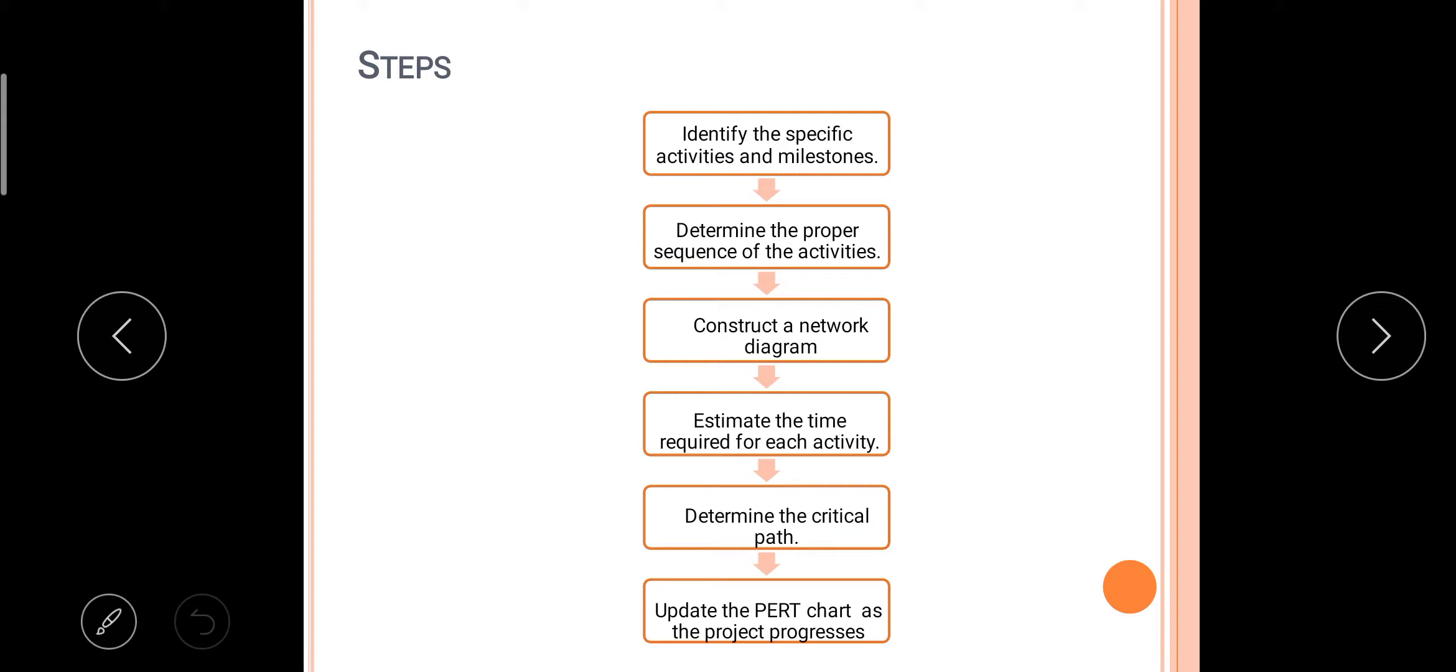Then determine the critical path. You have to determine the critical path for reaching your goal. And update the PERT chart as the project progresses. So as you are progressing on your project or work, side by side you have to update the PERT chart also. Okay, this one completed, this was delayed, this is in progress, this is fast. Whatever the work progress is, the same way you have to update in your chart. So these are the few steps of PERT.